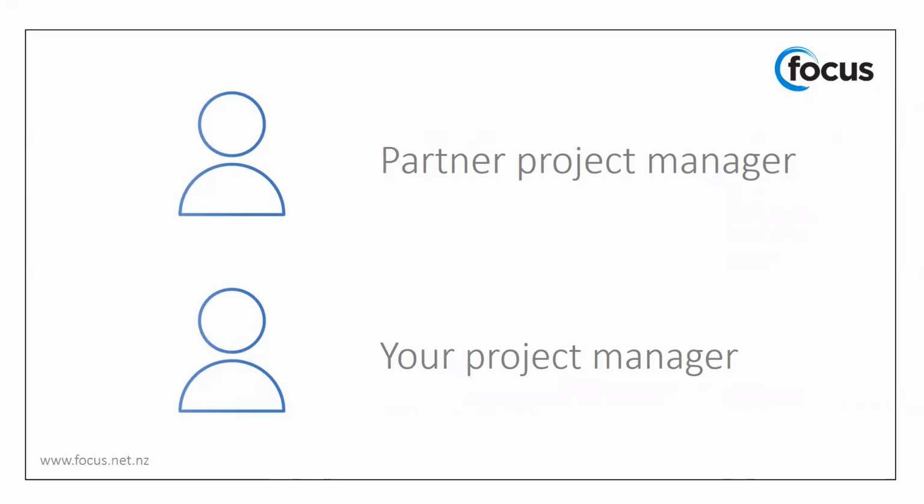I can't agree more, Renee. The role of the project manager is a key person in the implementation, and they are there to ensure that the project is always moving in the right direction. Now, we spoke earlier about containing the need, and it really falls on the project manager at times to make the tough decisions and have the conversation about what should be done in the initial deployment and what should ideally be done later. Or, if there are new requirements that arise, clearly communicate this with the customer as to what impact their inclusion will have on the overall cost of the project, as well as, quite importantly, the timeline of the project. So, Renee, what other people can a client expect to be involved in the project?